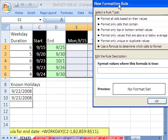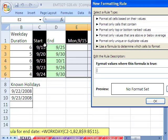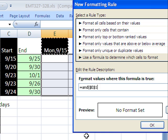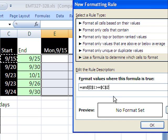What we're going to do first is simply ask, of each cell, we're going to have to look at the column header, this date, and say, is it greater than or equal to that, and less than or equal to this. So that means we're going to be using the AND function. Now, I'm going to click on the column header. It needs to be locked in front of the row reference, but not the column. Hit my F4 key, dollar sign in front of the number only, greater than or equal to this start date.